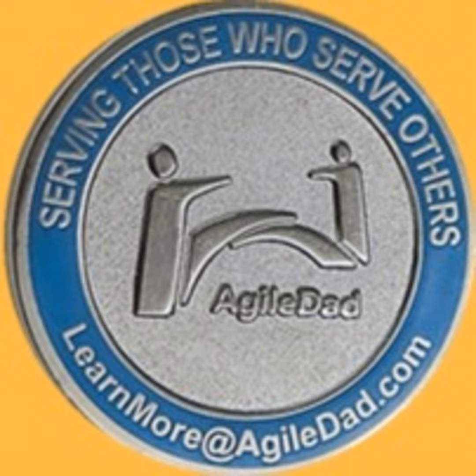This helps make sense if you have multiple products or services that you're trying to boil down into one backlog. So if you're in an organization where you had 20 products or services and you were trying to boil down to one large Scrum team to be able to perform that work in a cross-functional way, and you were constantly getting requests from multiple stakeholders, and it was unclear who the real product owner was, the concept of having a sprint backlog that covers everything that might be detailed or covered during a sprint across more than one team, and the concept of having a team backlog that shows team by team what's scheduled for delivery would actually make sense. Call it a filter process, if you will.